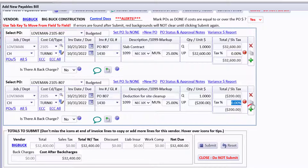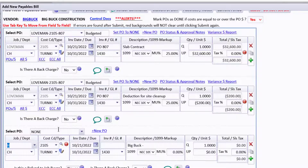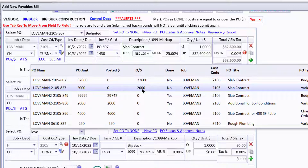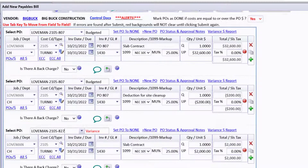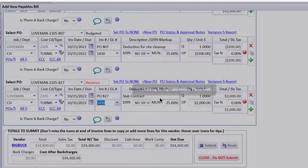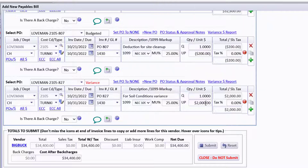I want to add a new line for the variance PO. Let's do the $2,000 variance PO for Loveman — it's not registering that I've paid the $32,600 because I haven't posted it yet. We'll call this one PO 827 and everything else fills in for us. This is for soil conditions variance — you should be pretty specific in your descriptions — and the $2,000 came in.